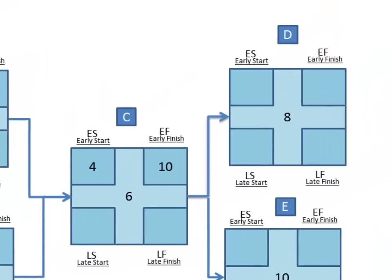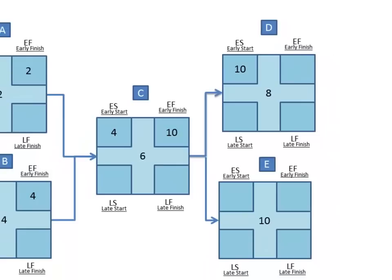So now we're up to task D. D is waiting for task C to finish, so the earliest D can start is day ten. This holds true for E, since it too is waiting on the completion of C, so let's put a ten in the early start for E.